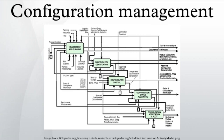Configuration identification consists of setting and maintaining baselines, which define the system or subsystem architecture, components, and any developments at any point in time. It is the basis by which changes to any part of an information system are identified, documented, and later tracked through design, development, testing, and final delivery. CI incrementally establishes and maintains the definitive current basis for configuration status accounting of a system and its configuration items throughout their lifecycle until disposal.